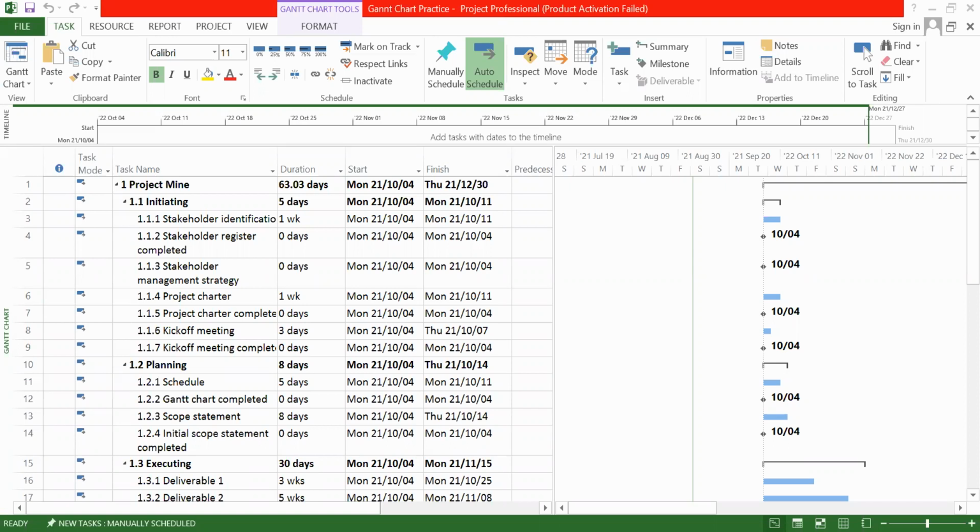Okay, so let's say there is a dependency between task 1 and task 2. You say task 1 is delayed, only 50% or 25% completed. So they should know that only when that particular task is completed will they start the next activity or next task. So this kind of thing we have to mention in your project. For that, there are different purposes. First, let's see how to create the dependency. Then we'll see how to mention the FS. FS means finish to start process.